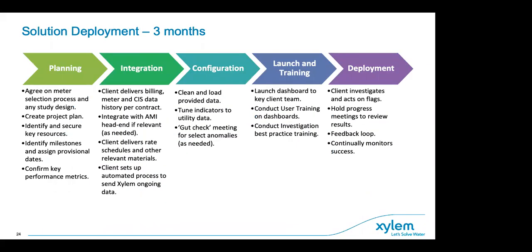Now, what does it look like? There's a lot of data, a lot of information on this slide here, but if we just look at the bar itself, we have a planning phase, integration, configuration, launch and training, and deployment. The planning phase is how many meters are we going to be analyzing? Is it the whole population? Is it a subset? And who's going to be involved from the utility side? And what do we expect to get back from this? So setting some key performance metrics is really important at the start. So there's an expectation of what can be recovered, and then you can measure and track the actual success of the program against those expectations.